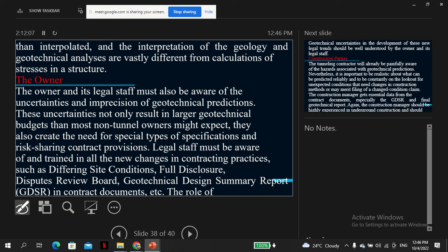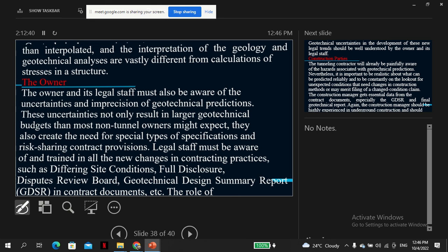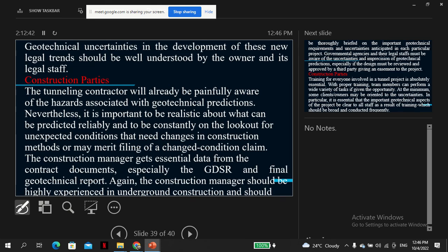This is a special condition that provides ways to resolve disputes, because these kinds of projects are quite specialized, and in a court of law, if you try to canvass these issues, even the lawyers have no idea what you are talking about. So we have special dispute resolution boards, that have specialists who might understand whatever you people are talking about. So again, the owner has to know all these things, so in case of any dispute, you can find your issues solved amicably.